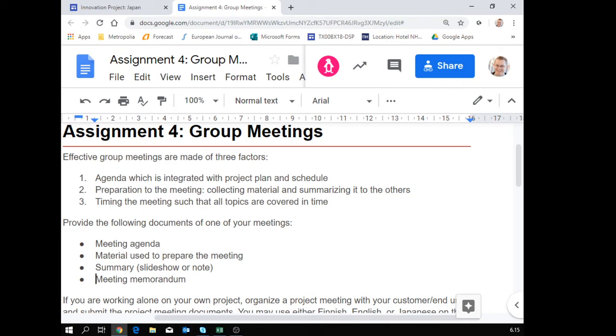For example, if you have a meeting in December somewhere in here, a kind of checkpoint meeting where you have done the designs, hardware, software, and integration, and then even the box, and start to work on the prototype, you have a checkpoint. Those checkpoints should be included also on your timetable. But you can add those. Remember, the timetable is a living document.